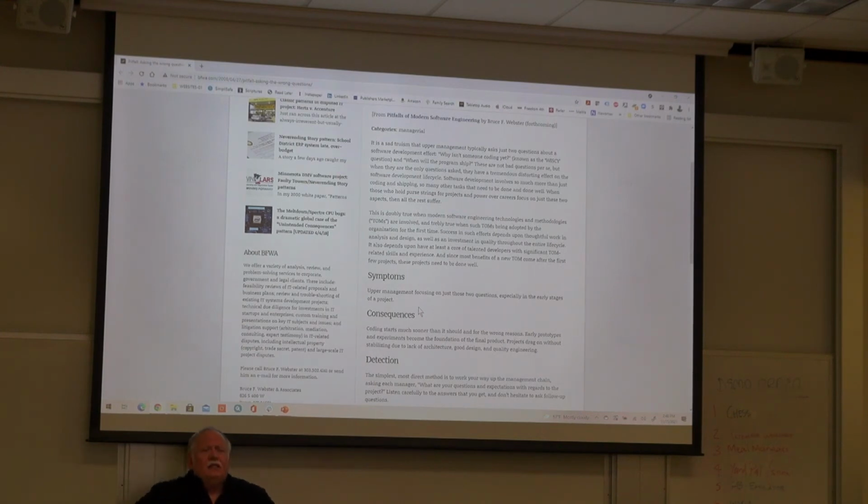and he talked about a new project that a small group of developers had spun up and had already started implementing without actually talking to the rest of the company about access to data tables and what would work and what fit. In essence, they got to a certain point and they had to unwind everything they did, because they didn't bother to ask the rest of the company how this fit in with the existing tech base of operations with the company and with existing products as well.